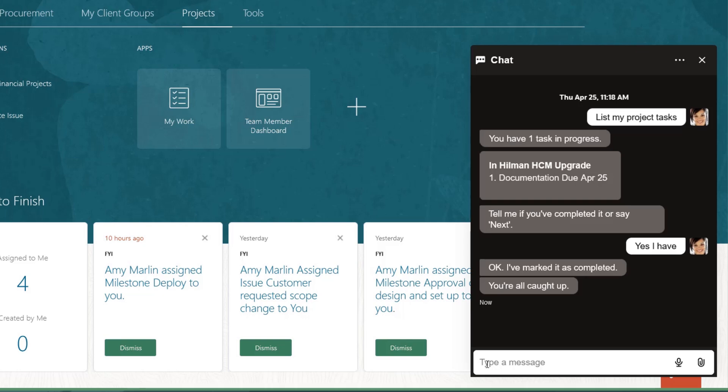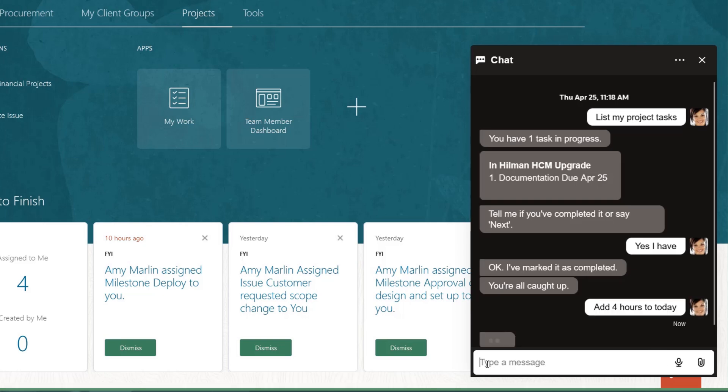Doing so means the milestone is met and billing approvals can be initiated. While conversing with the digital assistant, she also asks it to update her time card.